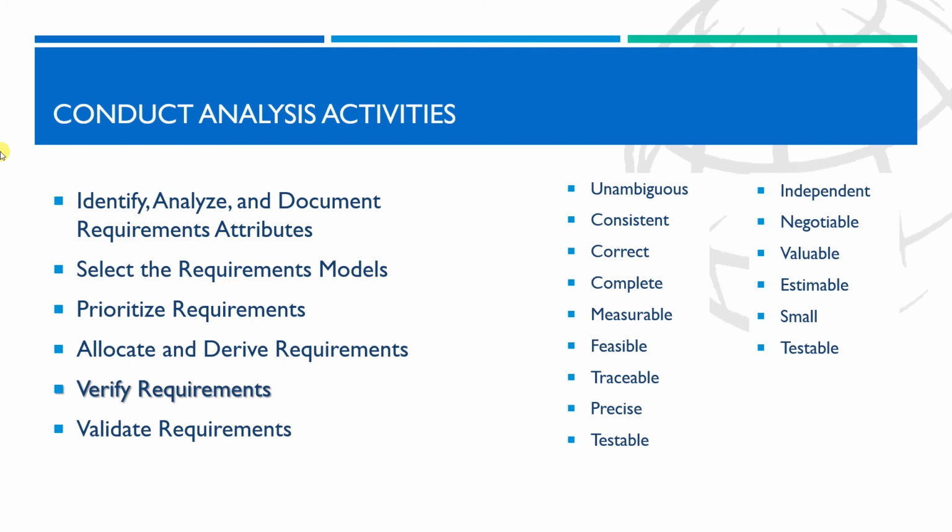refined to provide greater insight and correctness, and they elicit additional information to define the details necessary to build the product, service, or result. As some models are better suited for certain environments, it is important to select the requirements model based on specific characteristics, type of project, methodology, time, purpose, and level of abstraction. Requirements models are constructed at various levels of detail.